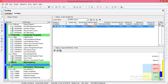Now we have the Schedule Performance Index (SPI) and Cost Performance Index (CPI). The SPI value here is 0.71. If the value is less than one, we are behind schedule — it means the project is going to be delayed. If SPI is more than one, we are finishing the project earlier than the planned finish date.